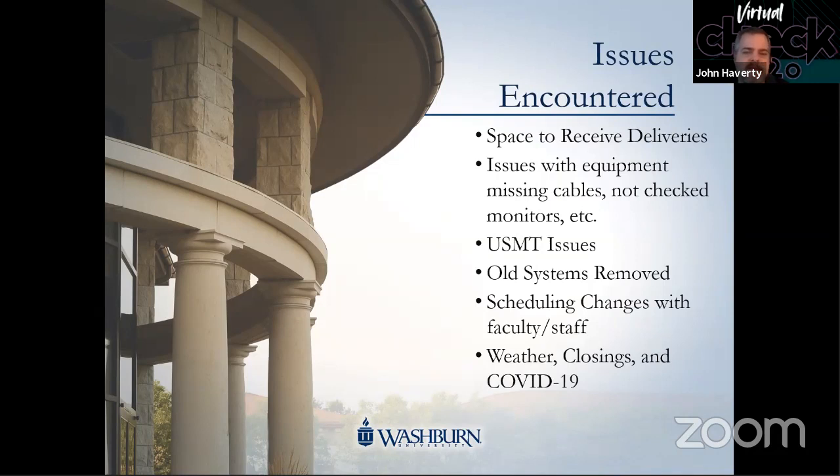The other thing that we had during this whole process is that when we tested these systems way back when, because we were somewhat doing it in, I wouldn't say hurry, we were going through and checking each system, but we didn't get monitors in for any of the test systems. It just wasn't something that we thought of necessarily. So when the equipment came in, this was primarily for the workstations. We went out to install them. Those actually got sent over to our law school, which was included in the lease process, as I mentioned. They got their workstations. They went to install them, had a Lenovo monitor there with them to install, and found they couldn't install it because it was missing the cable.